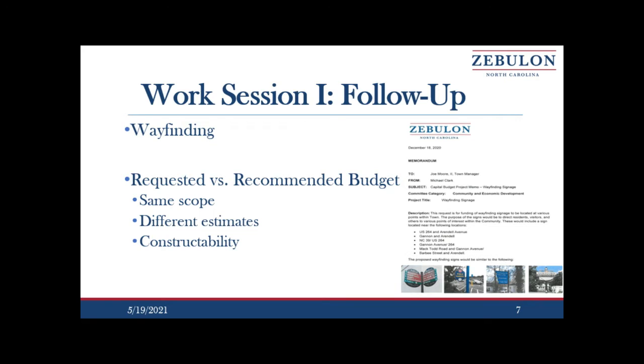That's probably a good price, especially when you look at some of the wayfinding that has been done by municipalities around us. But that's going to be representative of a sign like that, and it's not going to be adequate to reflect the cost for the interchange wayfinding signs that is proposed in here. Based on my experience, those could range from anywhere between $10,000 and $12,000 a piece. And if you do two at each interchange, the budget is not going to be enough to fund that.